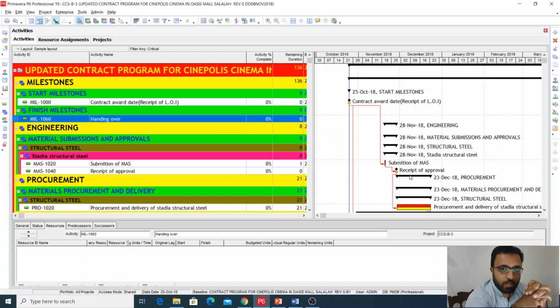So the operation theatre falls under the critical activities on your hospital project, because unless your operation theatre is operational, and since all those pipes terminate in the operation theatre, all these corridors and activities will be linked to it and be critical. So that is a critical path for the hospital project.